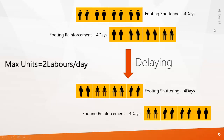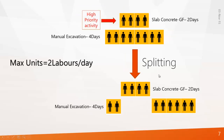Let's look at this example. There are two activities: footing shuttering for four days and footing reinforcement again for four days, where two labor forces are working. When it reaches day three and four, you require two more laborers to finish the task on time. But if your company has only two laborers and your resource manager is not ready to give you more, in such cases you can go for an option called delaying — you delay the footing reinforcement activity by two days so you can manage your resources. This technique is called delaying.